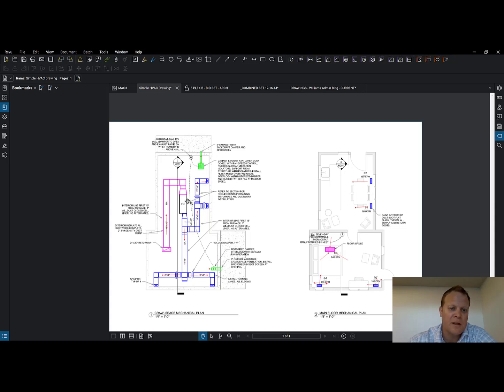I don't know. Are we gonna get the floor completely done before we get this ductwork in? Are we gonna let people have to do it on their hands and knees and get this all done, or are we gonna let the floor framing happen and then rough and do an inspection and then put this ductwork in? Maybe there's just not a lot of room down there, and that's the best way to do it, and then we cover it with the floor sheeting. Not saying that's how you have to do it.